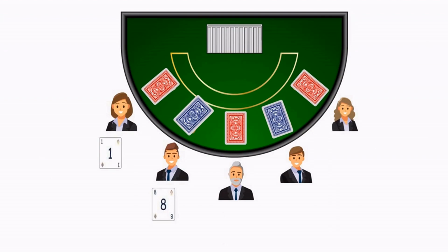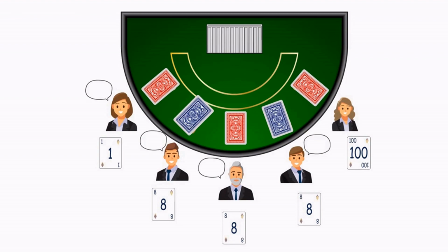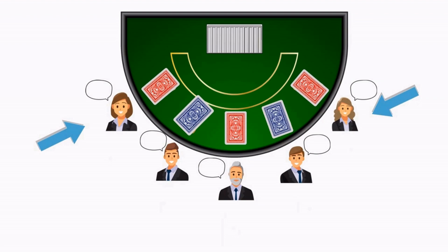And why is this meeting called planning poker? Because everyone in this meeting has cards that have a number corresponding to a certain number of story points. To make the assessment as fair as possible, everyone chooses their own number of story points when declaring the task, after it has been analyzed. Then the cards are revealed so that the scores are visible to everyone.